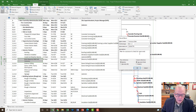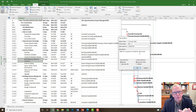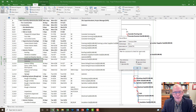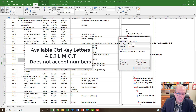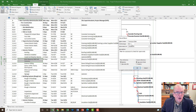Now I could put a Control key letter here. You can use any letter that's not already taken, and there are a lot that are already taken — like Ctrl+B for bold, Ctrl+X for cut, Ctrl+V for paste. The letters that are still free in Microsoft Project are: A, E, J, L, M, Q, or T. So you could have seven macros with Control shortcuts, and you can make a lot more macros without using the Control key — save those for your most important ones.